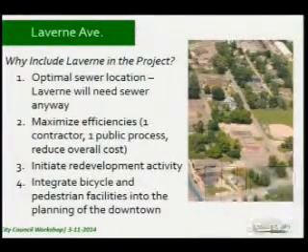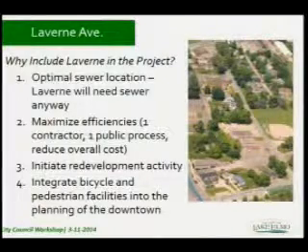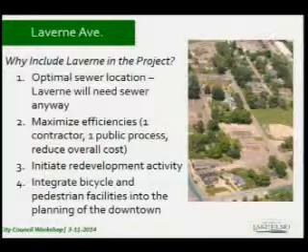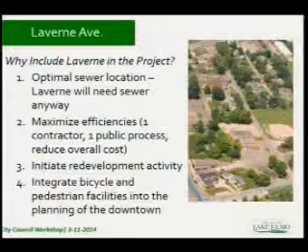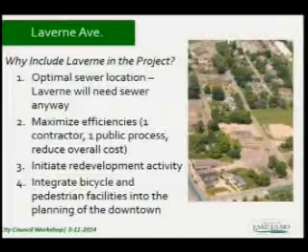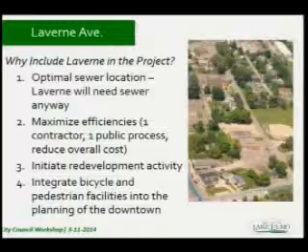Laverne Avenue. In the scope of looking at this project, it's become quite clear to the staff, who have been working with the county as well as the consultants in Valley Branch, that the inclusion of Laverne Avenue might be a critical component of this project. Now, what are the reasons for that? Number one, the biggest driving reason why Laverne Avenue, in our estimation, should be included in the project is that Laverne Avenue is the ideal location for sewer. By locating it within Laverne Avenue, you are able to pick up more properties in the immediate downtown area than if you were running the trunk sewer down Lake Elmo Avenue.